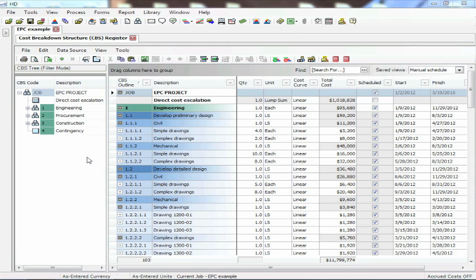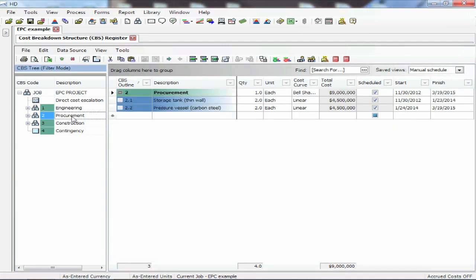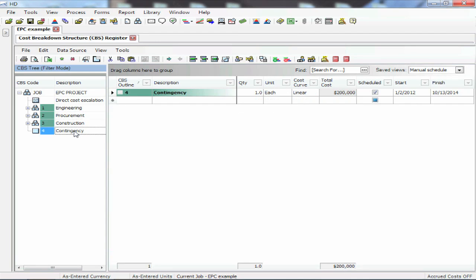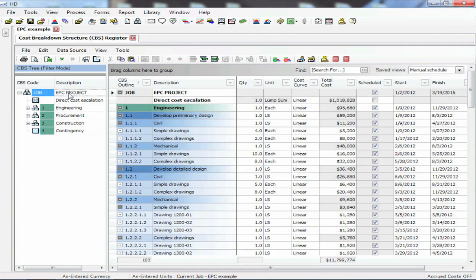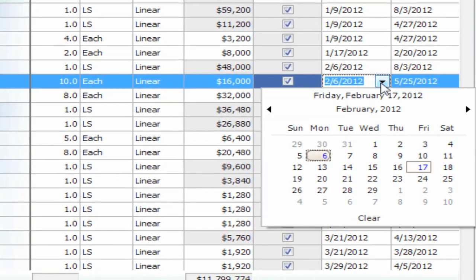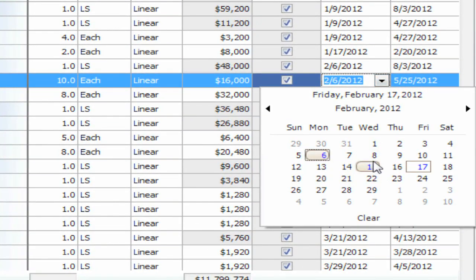Here's a project — a simple engineering procurement construction project. You can see it's organized over to the left as a typical EPC: engineering, procurement, and construction. We also have a contingency and an escalation up here at the top. By tying the cost model, our breakdown on the right breaks down our costs into a hierarchy. We've now added the element of time, so as we look over here to the right, we see our start and finish dates. Those can come from a Primavera schedule, a Microsoft Project schedule, or in this new version, we've even opened up a manual schedule so you can manually put in your start and finish dates.